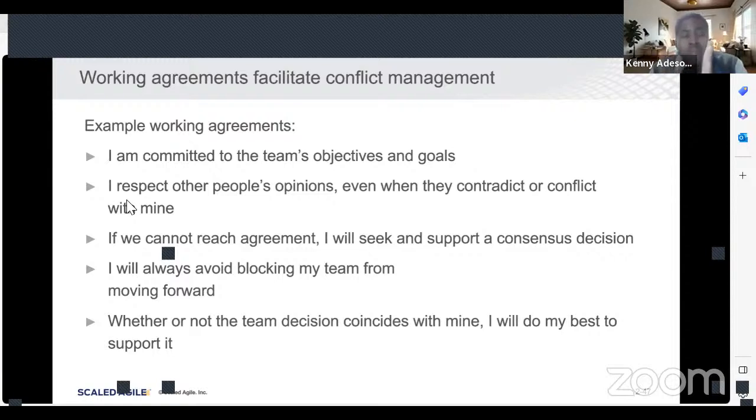Those are working agreements. Whenever you start working, you need to create a working agreement for your team. And it has to be placed in a place where they can always see it. Probably on a shared drive, or maybe on a Confluence page, wherever they can be able to access it all the time and review it. Usually you want to review this every quarter. For example, you want to put on there when your meeting starts, when your meeting ends, who are supposed to come to the meetings, the dates of that meeting, your engagement about your vacation, how do you report your vacation time? A lot of things would come into play, right? But it's very, very important to have a working agreement. Whenever you start working and you need help with that, please, I can help you. You can reach out to me, okay?